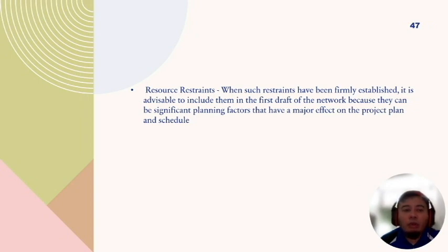I need to remind you about resource restraint. In a job, typically you have resource restraints. Resources could be limited, and this type of limitation dictates your job logic. When such restraints have been firmly established, when you have defined the restraints, it is advisable to include them in the first draft, because they can be significant planning factors that have a major effect on the project plan and schedule.